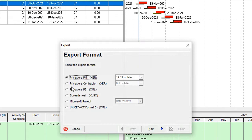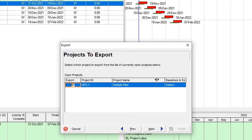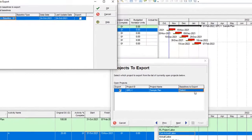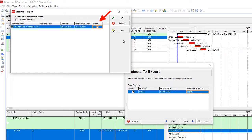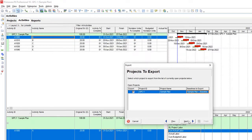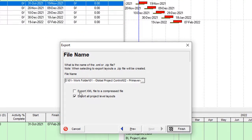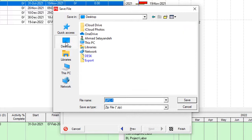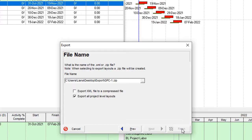You can also export the project in XML format. What is the difference between XML and XER? With XML format you have the option to also export the baseline included with the project. You can select the baseline over here. If you press the baseline to export, a dialog box will open and you can select your current baseline. Then if you proceed you have two options: export XML file in a compressed format, or export all project level and layout. Over here you can select the path for your export.